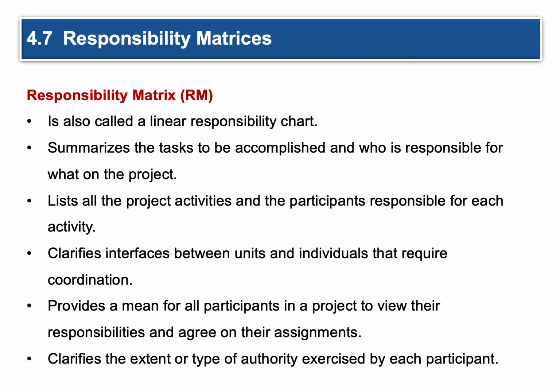It's the responsibility matrix, RM. It's also called a linear responsibility chart. You're in a group of 5 people. It summarizes the tasks to be accomplished and who is responsible for what on the project. Divide and conquer, right? Many hands make light work.